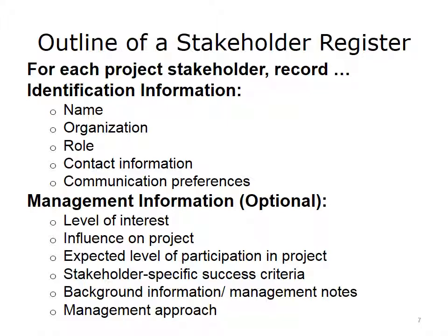Does that mean having this team member more visible in some meetings with the customer? It can actually be helpful to build trust between the customer and your team because of this relationship. Keep in mind, if documents like this are part of projects funded by government agencies, the Stakeholder Register may be open to being accessed by way of the Freedom of Information Act. Keep in mind the sensitivity of any information that you include.